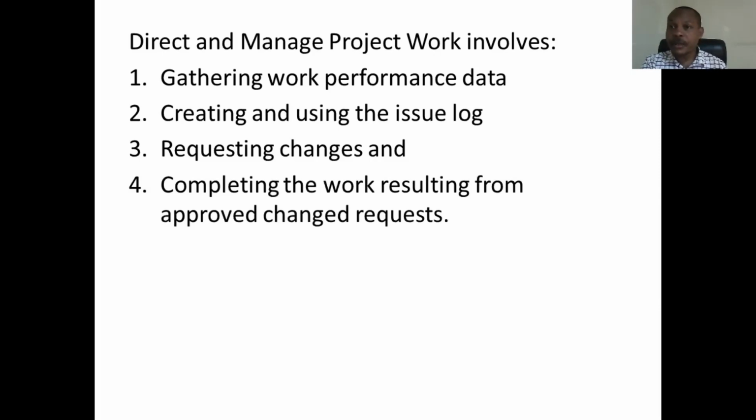The amount of money, the cost for the project, has already been generally agreed and signed. The schedule, the duration for the project, has also been agreed upon. And now you're bringing a change. Possibly your change could mean that you have to extend the time of the project. It could mean that there's going to be an extra cost to the project. It could mean that it may affect the quality of the project. So the project manager will have to do an evaluation to see how this change request you're bringing is going to affect the project. Once he has done that, he has brought out all the impact. That's an impact assessment of the change request.